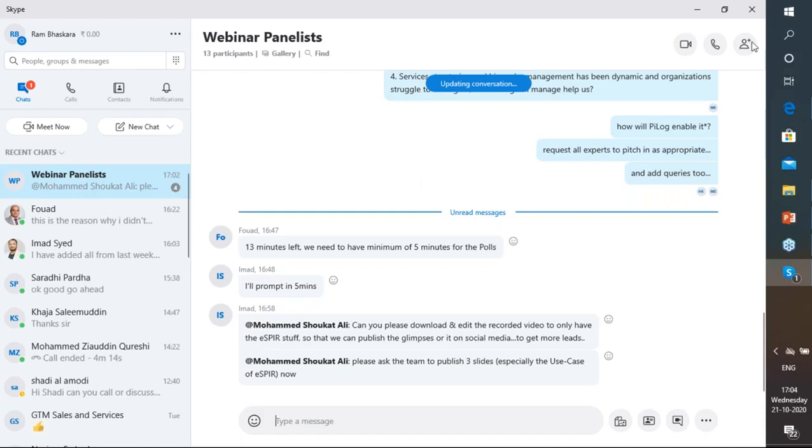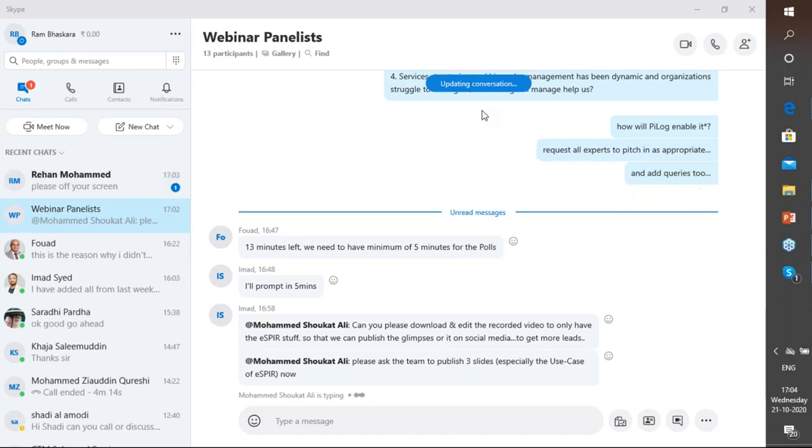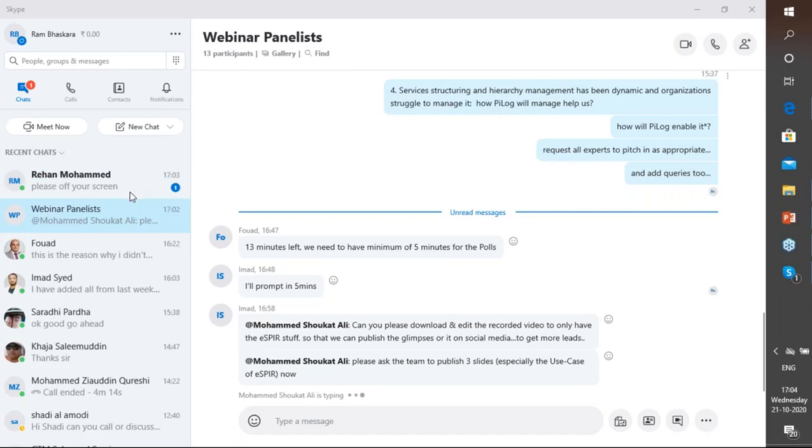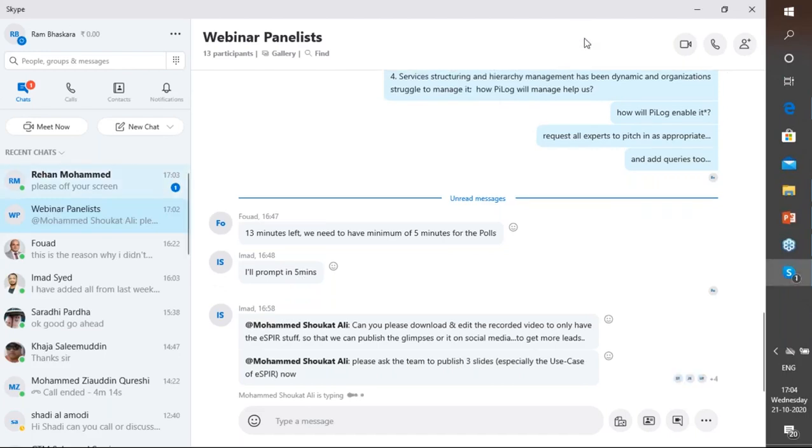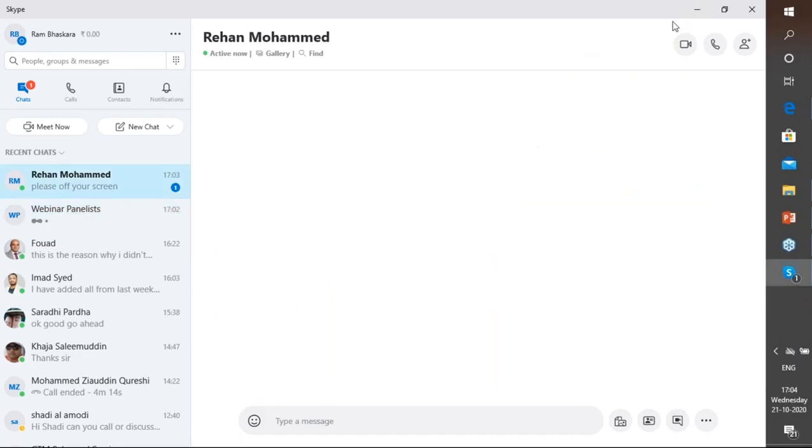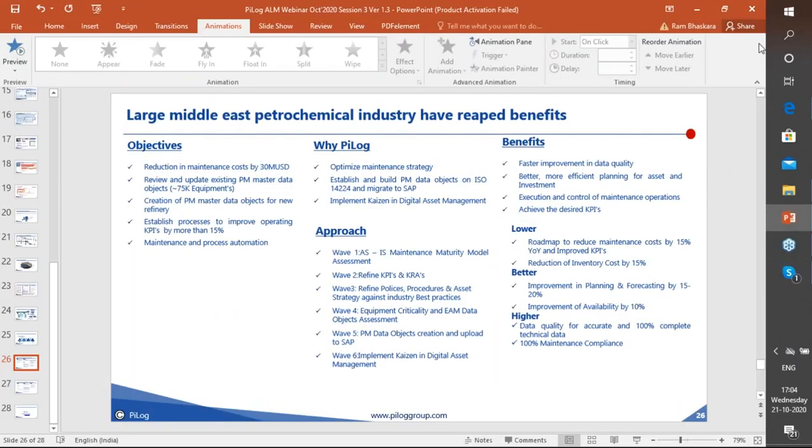Ahmad, I can give a little more light on this question which was asked last. Okay, please go ahead. When you are talking about the ESPIR template, we can also look into another aspect: when an EPC contract is being awarded to the vendor, especially when it is a large project, we can request him to interface his ERP system with the PiLog MDRM, wherein not only services, but all materials and services which are procured by the EPC contractor using his ERP system can be seamlessly brought into the MDRM, and from there to the ERP system of the company.